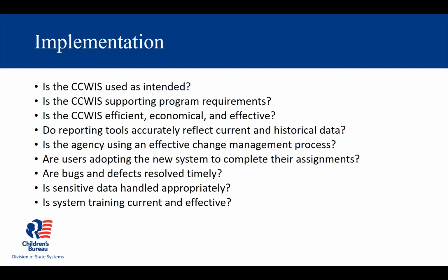Another one that's very important is the change management process. This, of course, is very critical as you're going through rollout, because you want to make sure everyone is prepared for rollout, that rollout goes smoothly. It's especially important if you're doing a changeover from a legacy system, maybe an old CCWIS system, to a new system. The change management will involve the training, perhaps on new ways to do business. If the CCWIS is being implemented at the same time that some changes in how business processes are done, you want to make sure that that is clearly explained so that folks aren't doubly confused, not only by the system, but by the change in how they do business.